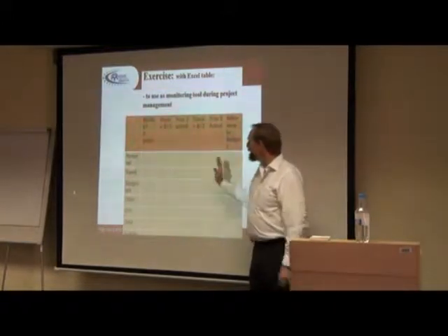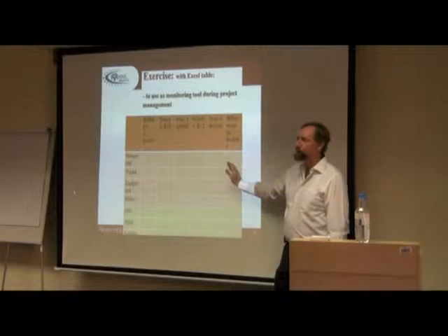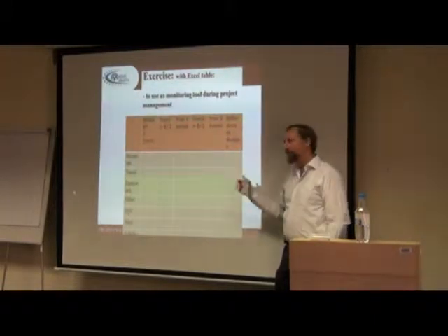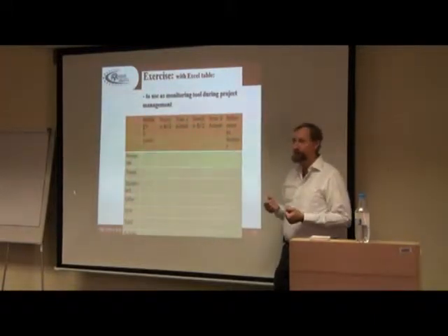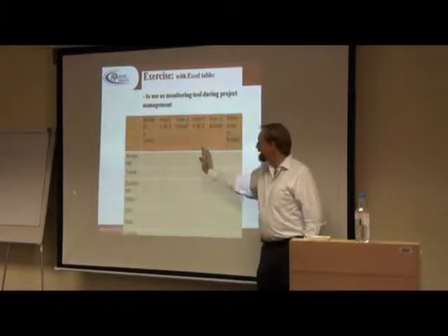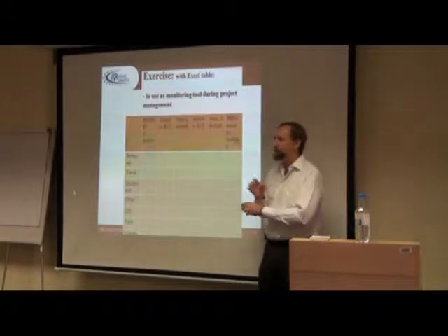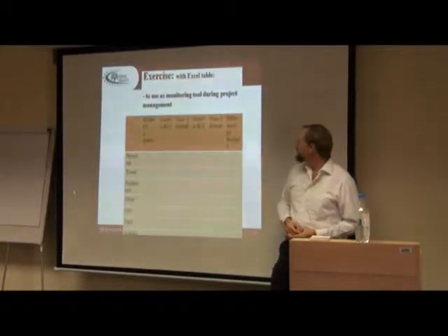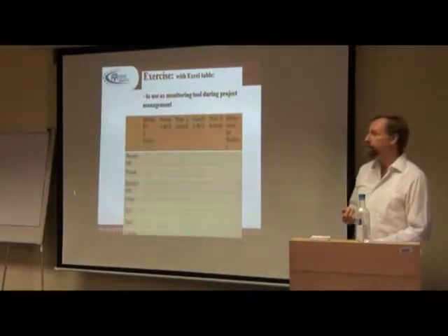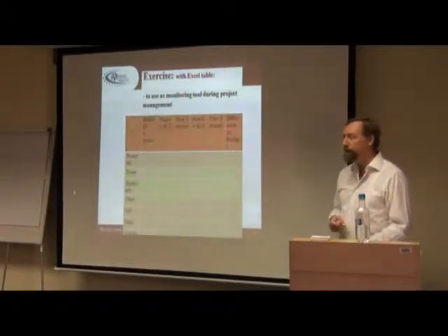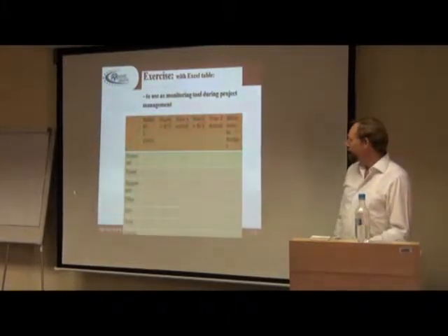And that is very useful because quite often at the end of the project there are problems and you're missing budget in certain categories. But if you use this as an evolving table during the project, you can immediately see where the problems in the expenses are. And that really helps with your reporting and your actual project management itself. So that's a simple thing.